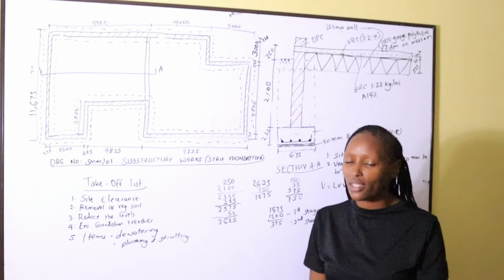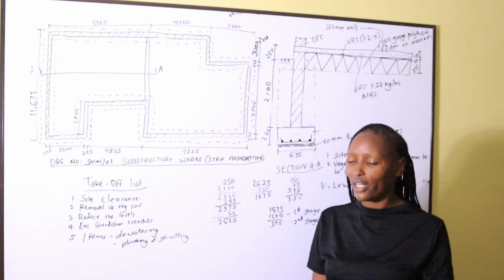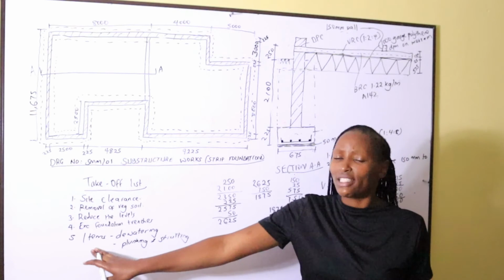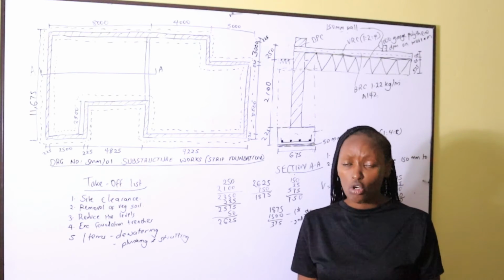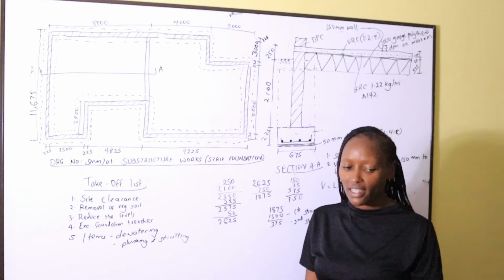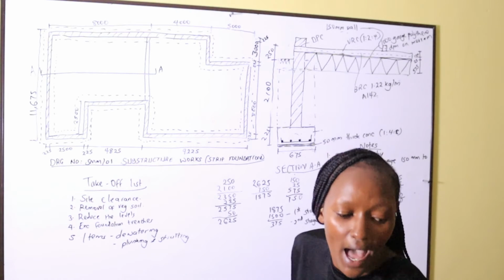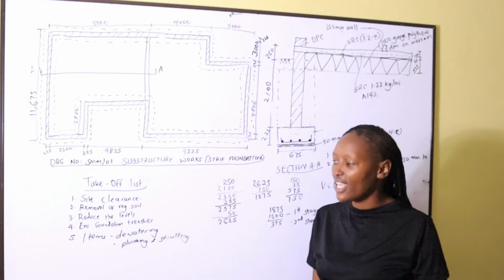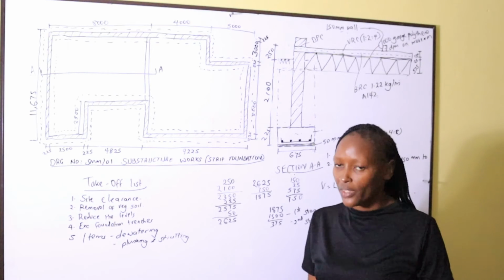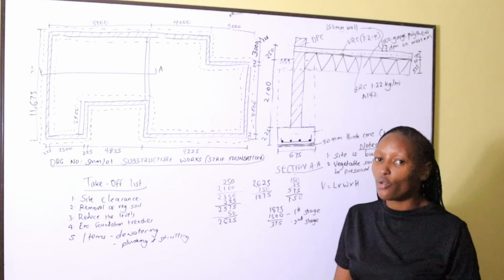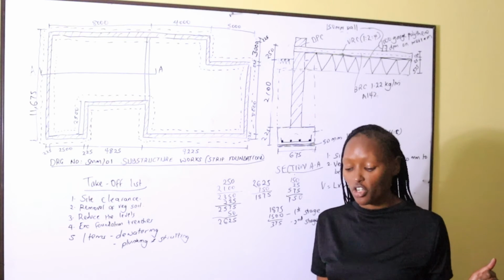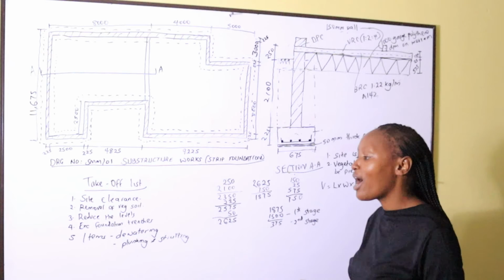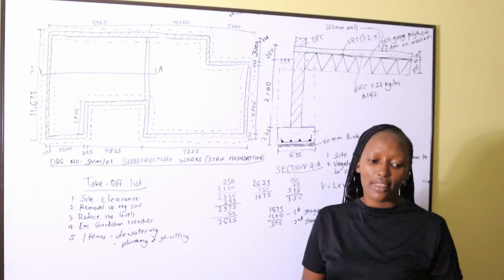Instead of doing the areas, the volumes, or the linear meters or the numbers, we shall write item in the dimension column. And this symbolizes the works that cannot be measured accurately from the drawings, like dewatering the trenches and planking and strutting. Once we have removed the water and we have supported the foundation trenches, if need be, we should now go to the concrete.